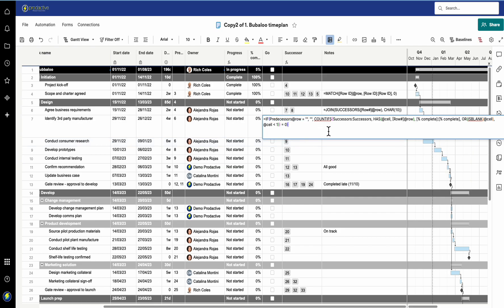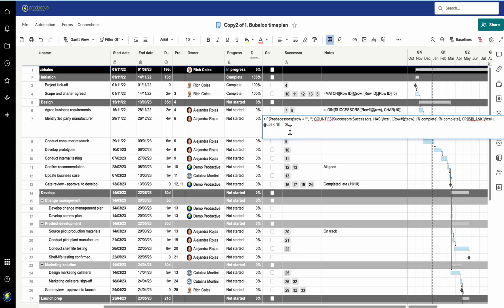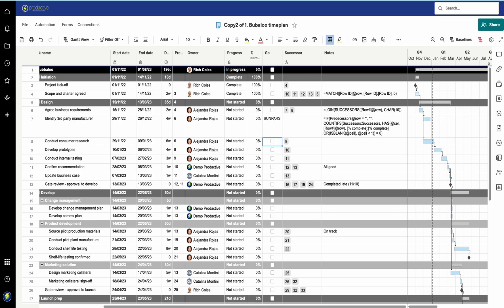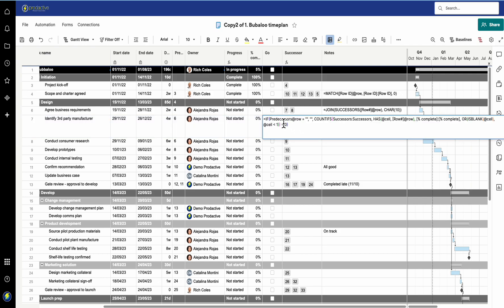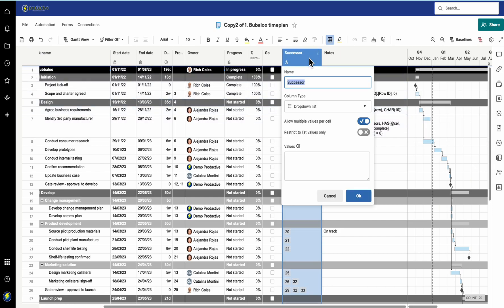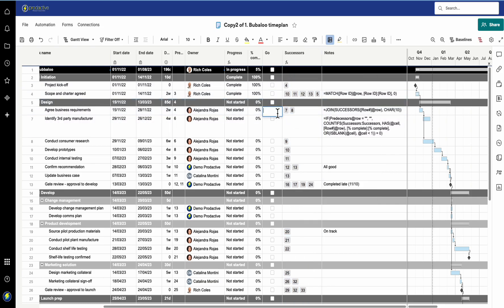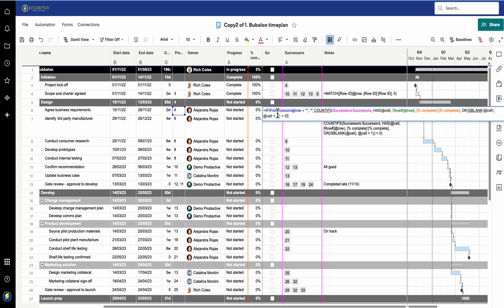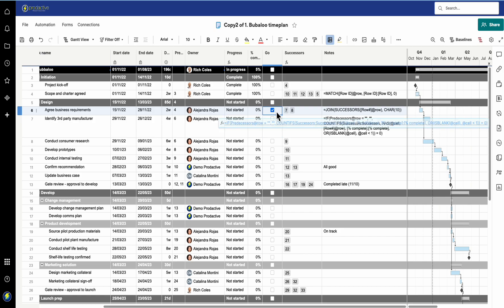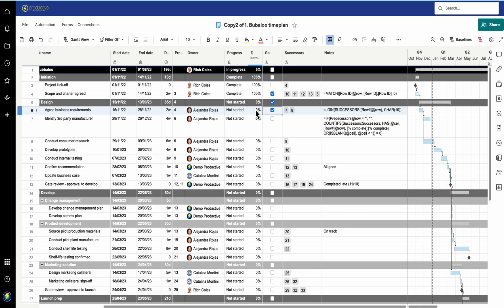The rest of the formula is looking through and evaluating the successor. It's looking to say is that successor there, and is that one completed or not? If it's either blank or less than 100% complete, then it's going to give a negative or zero value; otherwise it's going to mark it as complete. If I enter... unparseable, let me just take this out for a moment. The reason is I didn't put an S on successors, so let me enter that in here and paste it in. There we go, you can see it's now picked up the right column. Convert to column formula - that's now working properly.